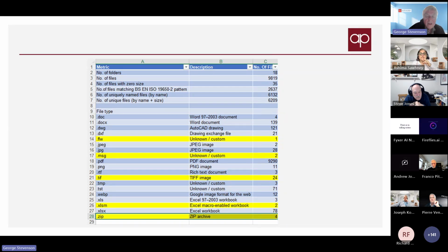And what we discovered was that there were zip files within zip files within zip files in the O&M handover information. My colleague Tim calls it like a Russian doll. And it's only when you actually get down and open those up that you find that there's a problem.